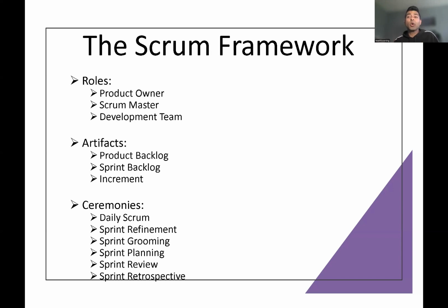Take an example, if you go on to one of the pages and it's not translating to Spanish, then it's a bug. We call it bug, B-U-G, or we call it defect. So then you have to create a defect, and whoever developer worked on this user story, you will assign this bug or defect to the same person, because he has worked on this one, he knows about this one. And then once he fixes it, again it goes to the QA, he tests it, and then again you have to provide the demo to the stakeholder, and this time it will be all good.